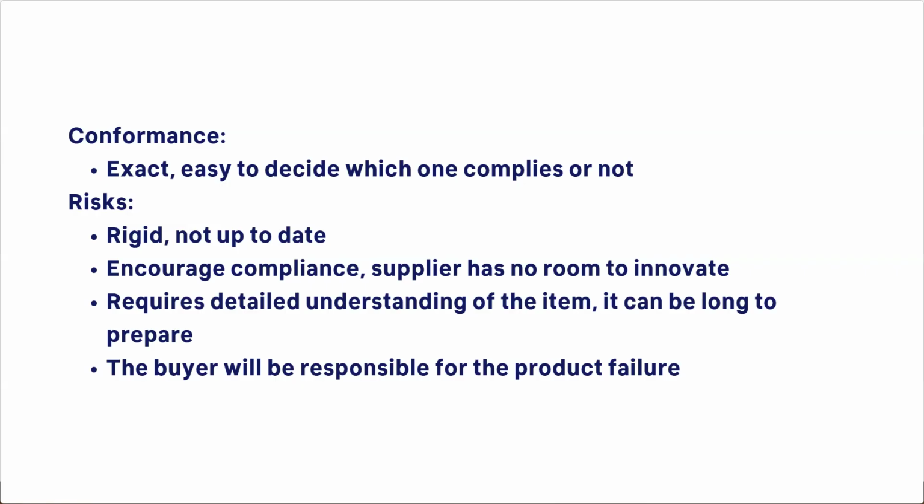It also requires the buyer to have technical knowledge about the topic, or if they don't, then we risk issuing an incomplete specification, and that may shift the risk to the buyer. So the buyer here will be responsible for the product failure.